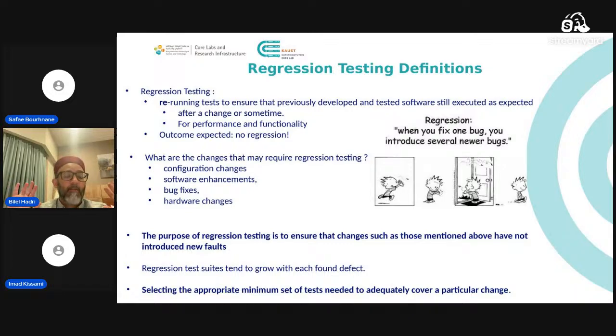So you know if vendor XYZ is exaggerating or sometimes underperforming, and is not telling you about some issue. I give you an example, now for the Turing: one Turing node, the AMD, can perform up to easily 13 teraflops, which is good. By more tuning, you can go a little bit higher. But if the vendor tells you 11 for some type, while the reference is 13, you may say, okay, this is not doing well. And the opposite, he should not tell you that it can perform at 15 teraflops, where you know the chip manufacturer cannot provide that. Okay, so this is when you buy.